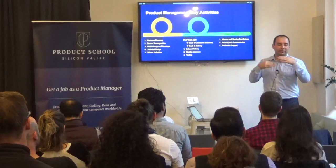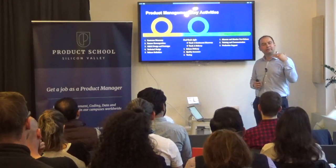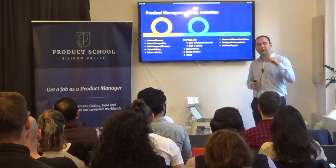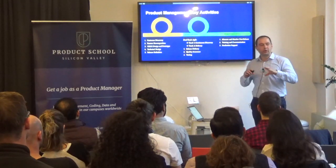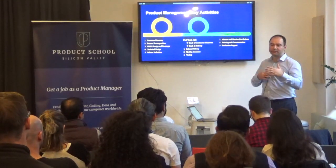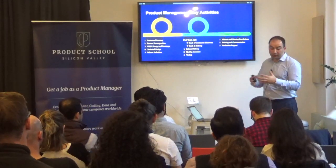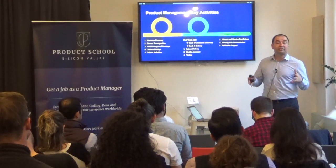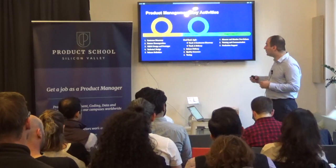exercise to slice out the releases and give a 50% confidence estimation on when the feature can be delivered. The story map is a great way to visualize all the features as well as slice up the releases, and it will help engineering as well as all the product stakeholders to have a discussion around what can be delivered by when, as a first conversation.